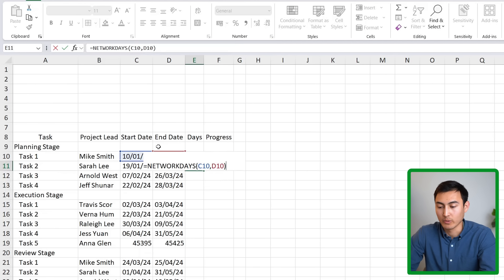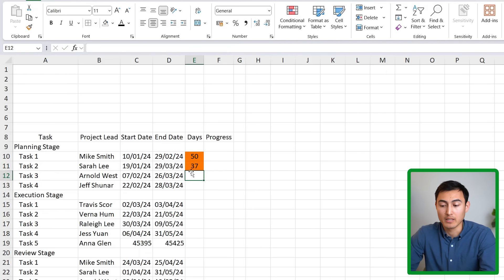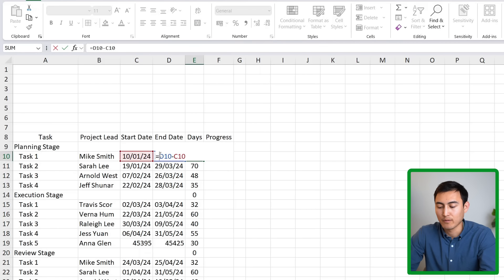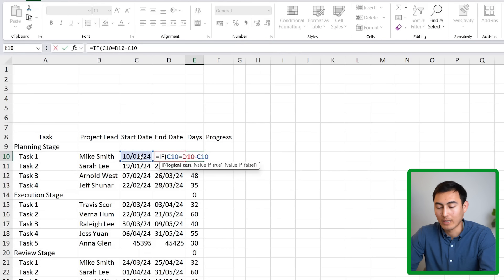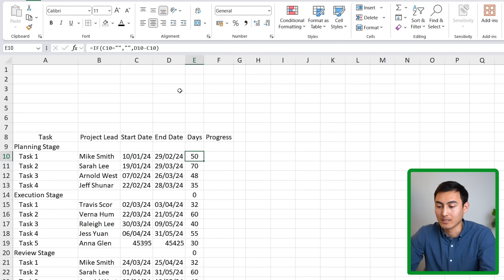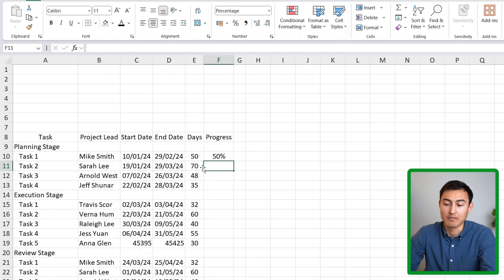After selecting start and end dates in NETWORKDAYS, you'll notice quite a difference compared to the simple subtraction. I'm happy with this approach, so I'll double-click to drag it down. To avoid zeros for empty rows, I'll add an IF condition: if the start date is empty, show empty; otherwise perform the subtraction. Finally, the progress column is just a percentage — for example 50%.